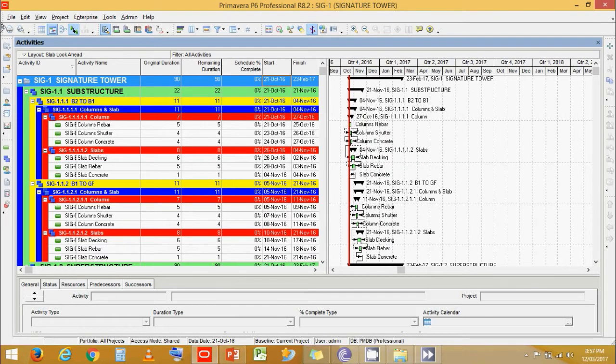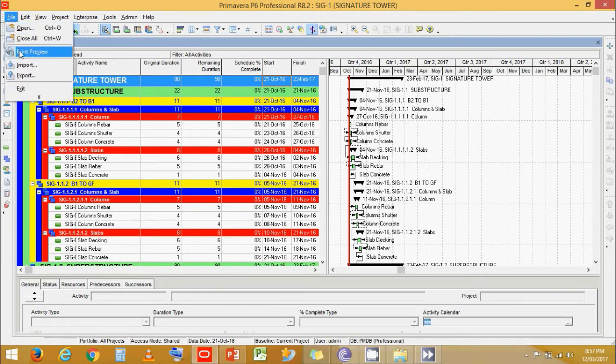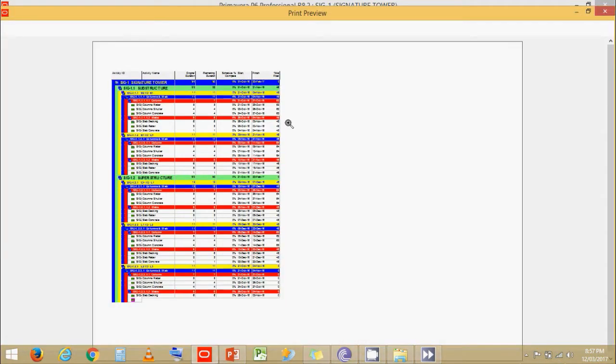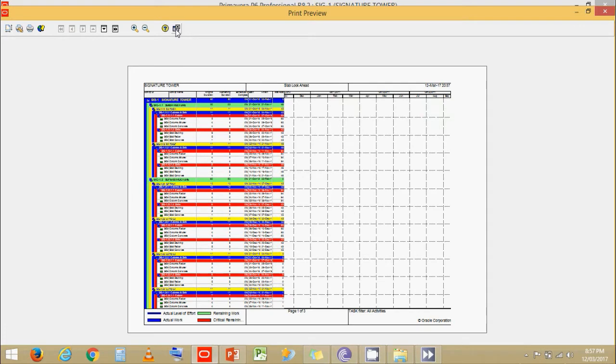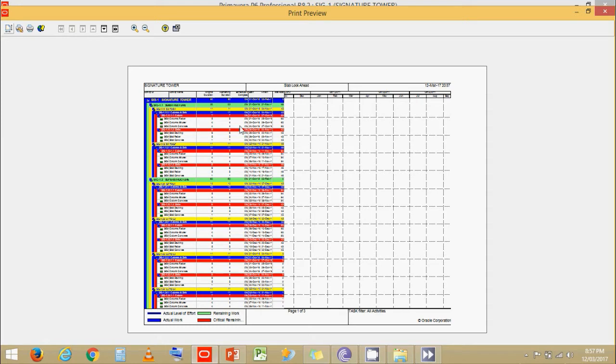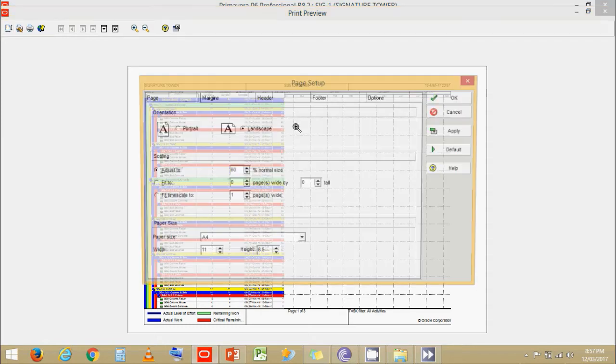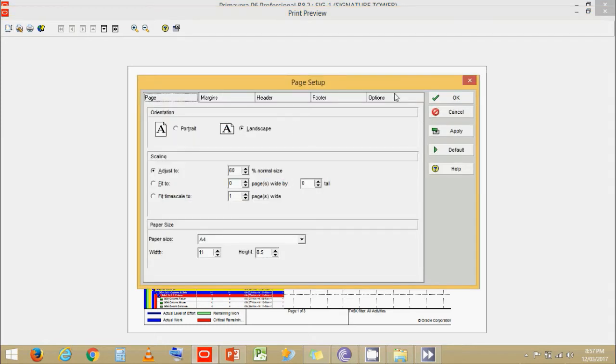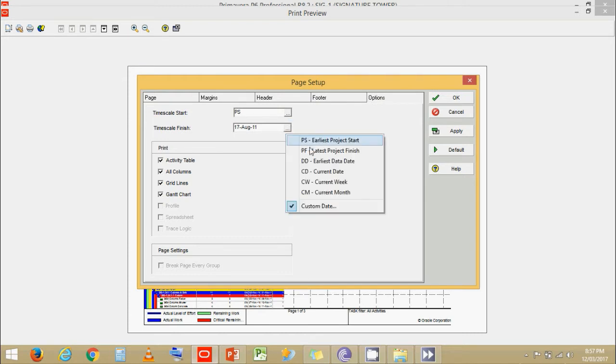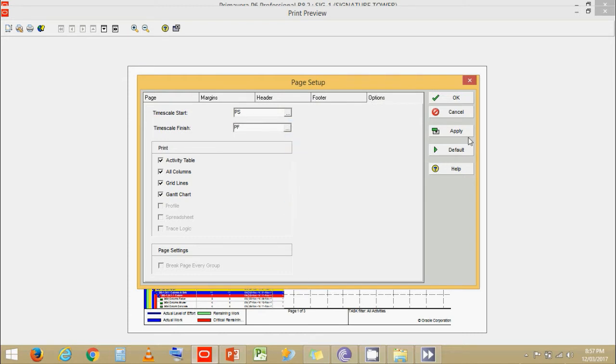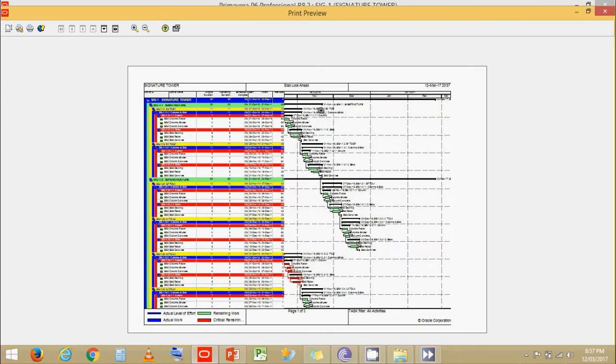Let's go to file. Go to print preview. Okay. The chart is still not visible. Let's go to page setup. Go to options. Set Gantt chart start scale as project start and finish as project finish. Now the Gantt chart is visible.